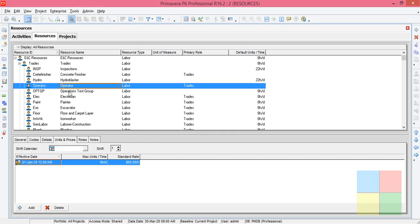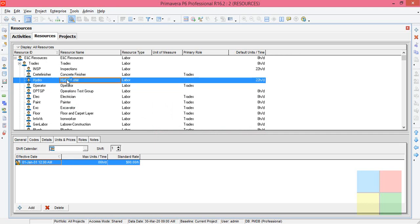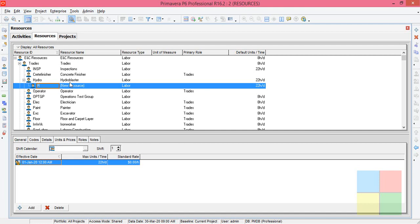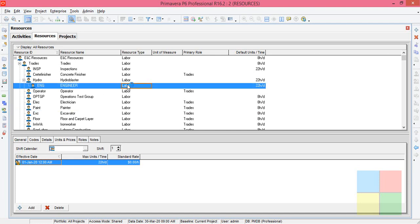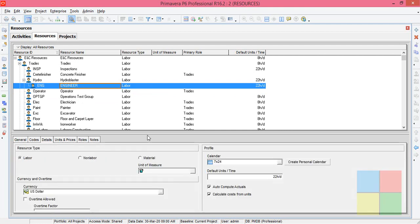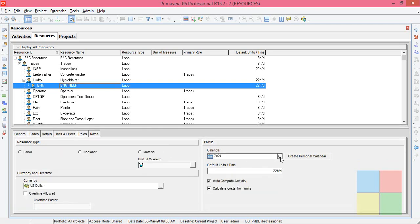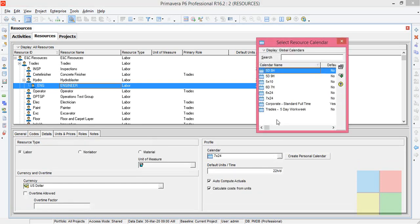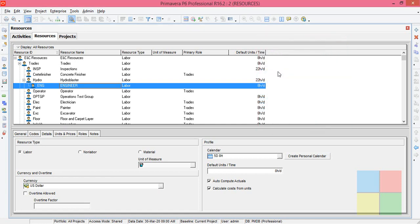Let us add a new resource. I'll place my cursor here then click Add. The newly created resource appears here. We'll rename it to 'ENG' — Engineer — and the type is Labor. Highlight the resource, go to Details, then select the calendar. Since we selected 5 Day 8 Hour for the project, for the resource also you have to go with 5 Day 8 Hour.